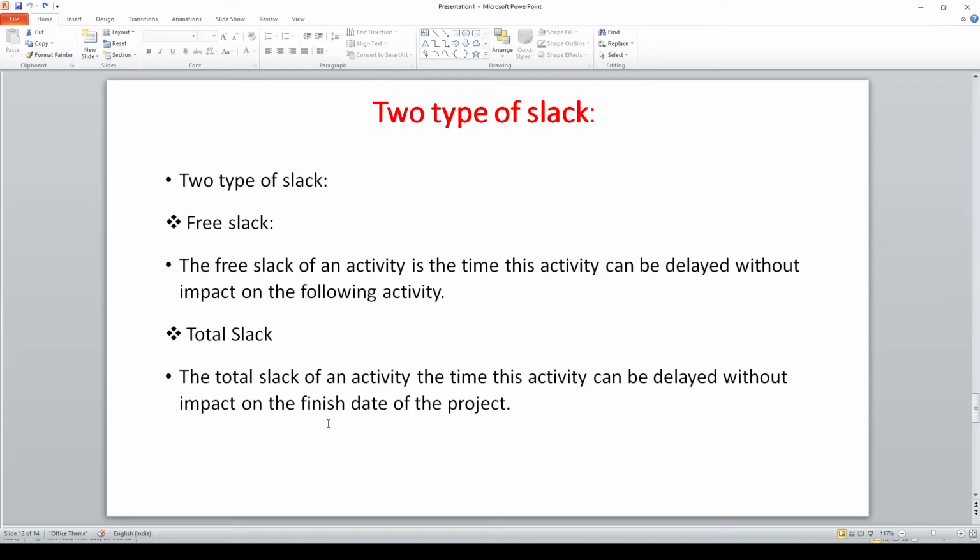The finish date of the project will not be affected if there is any delay in that particular activity. So that is the total slack. However, when we see this slack, we need to study it very carefully, because the assignments and relationships are important and sometimes it can mislead. So to create and see free slack and total slack, you have to be a bit careful as well.